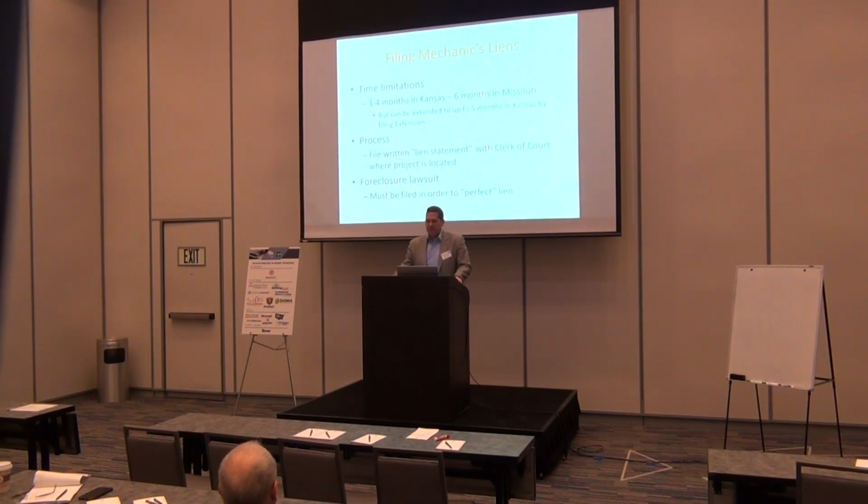So just in terms of deadlines, they're really short. I mean, they don't seem that short, but they are really short. If you finish up your project today, and you submit your final billing in a month, and they're telling you that the retainage is still hanging out there, 3 months can go by really fast. And so you need to know when the last day was that you went out there, because that's important, not when you billed it, but when you last went out there. Yeah. Last day worked, last day on site.